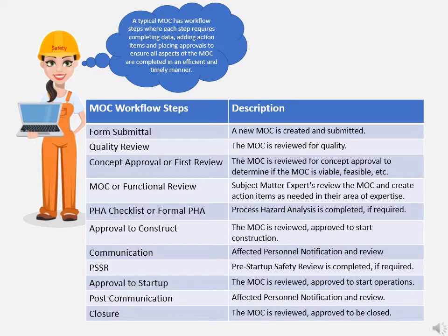A typical MOC has workflow steps where each step requires completing data, adding action items, and placing approvals to ensure all aspects of the MOC are completed in an efficient and timely manner. These steps include form submittal, quality review, concept review or first review, MOC or functional review, PHA, approval to construct, communication, PSSR, approval to start up, post-communication, and closure.